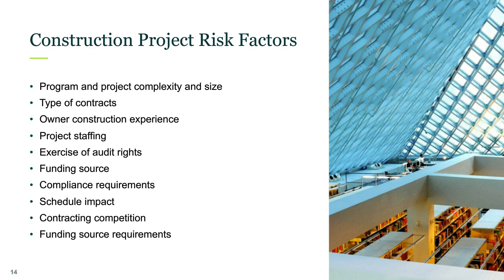All right, we'll go through these one by one. The size of a project and contract type can change the risk profile. That is, a $100K job should carry a different risk than a $100 million project. If your program is utilizing lump sum contracts, procurement controls and change management are common high-risk areas. If your program has GMP cost-plus contracts, procurement, change management, and expenditure management controls are common high-risk areas.